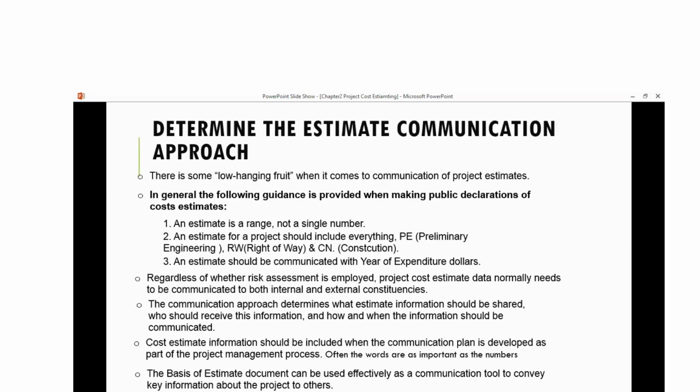Now, when you communicate the estimate, it's very important to give a range. Don't give one number. And this is actually what we do when we perform bottom-up estimation. So when we calculate the PERT estimate, right, we get the pessimistic, the most likely, and the optimistic time, divided by the average. So we get a number and then we calculate the standard deviation and we add and we subtract. So we get two numbers, a range. So I would say the project will take between 150 to 180 hours. So I'm giving a range.